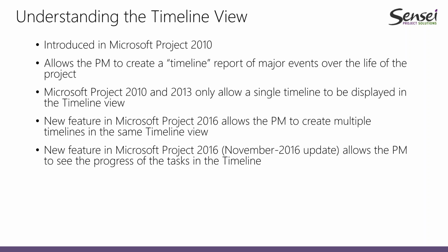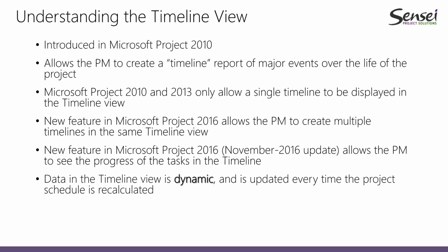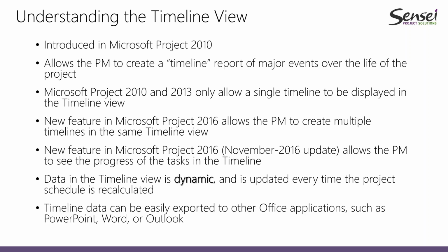One thing that is important to know is that the behavior of the timeline is dynamic. Any updates that we apply to our schedule and our tasks are going to be reflected in the timeline if the tasks are being displayed in it. Another good reason to use the timeline is that we can export it to other Office applications.